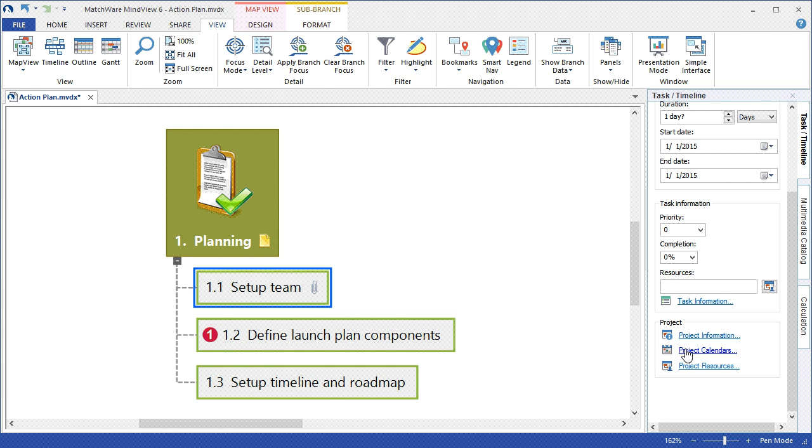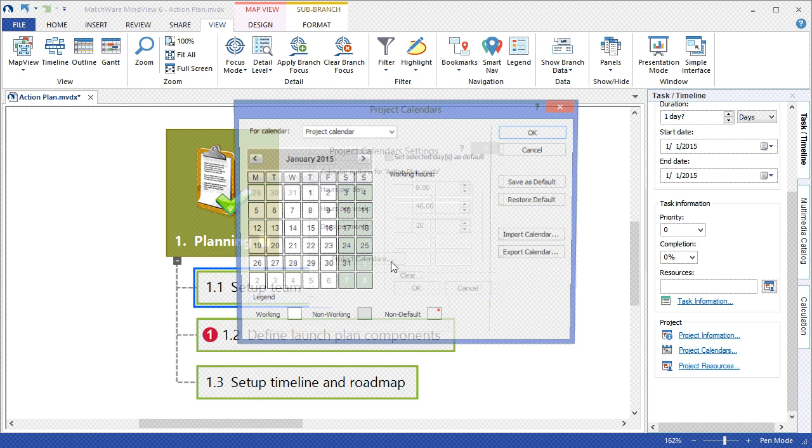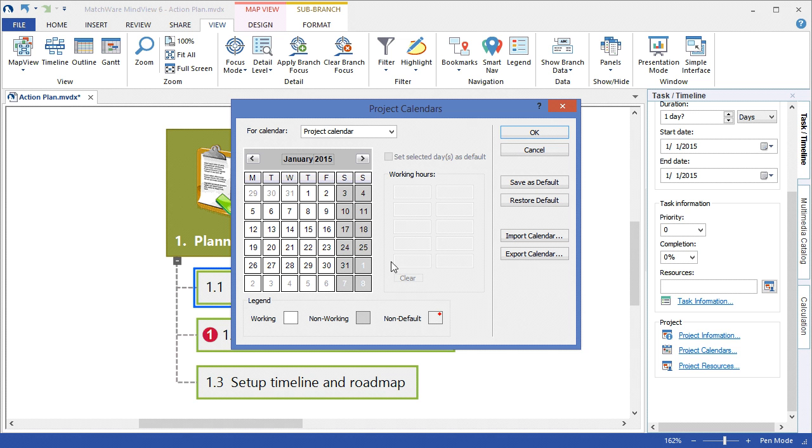The Project Calendar link allows the user to define what a working day is for their particular company. By selecting the Project Calendar link, I can choose to update the hours per day, hours per week or days per month. I can also associate an existing Project Calendar to list any holidays that may be with a particular working schedule.